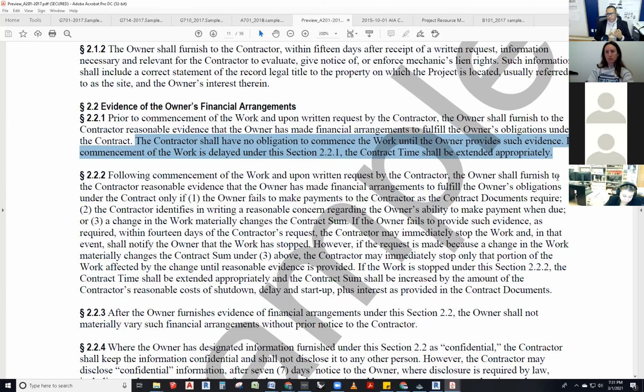If you can't pay me, and I'm now putting on the hat of a contractor, and I proceed with the work, and I start putting my money and my crew on that, which I have to pay, then I will have to suspend or stop the work for non-payment and sue you so that you can pay me. We go to court. I'm spending legal fees on top of the fees I've already spent having my people work on this job, and I'm wasting my time. This is not a place where I want to be, even if I have the winning case, because it might be 10 years before I actually get paid.